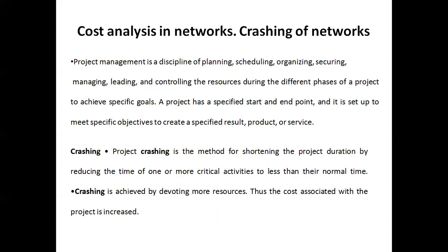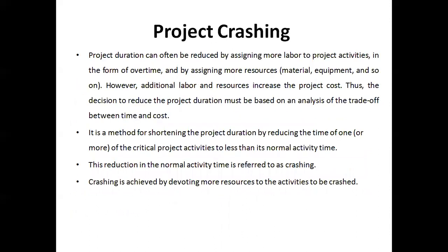And as we know, there are two costs associated with any project. They are categorized as direct costs and indirect costs. Direct costs, such as materials, equipment, and manpower, come under the direct cost. And the indirect cost means the costs which are supportive costs and which will increase with the increase in time, such as the interest on investment, overheads, rent for the equipment, and so forth.